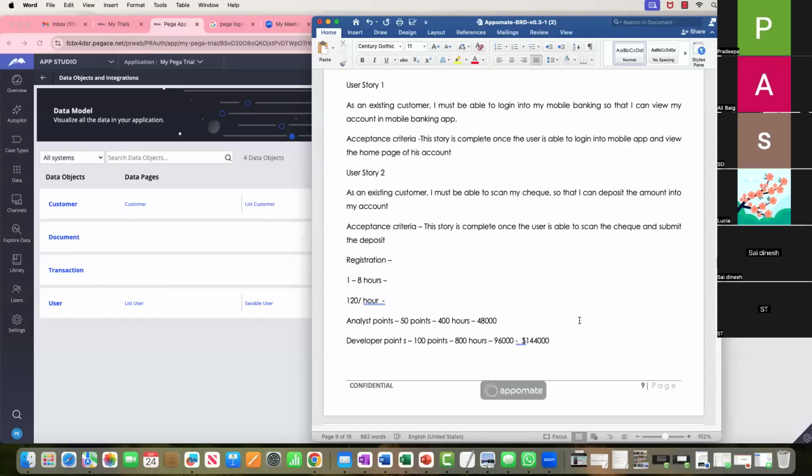with them. You're going to follow up with them. You're going to do documentation. You're going to constantly, I mean, there are multiple things. Your manager is going to come to certain calls. He needs a PRJ, and funding is very, very crucial, because if there is no funding, I've told you, they're going to fire you. So from an IT perspective, we always give 25% extra.